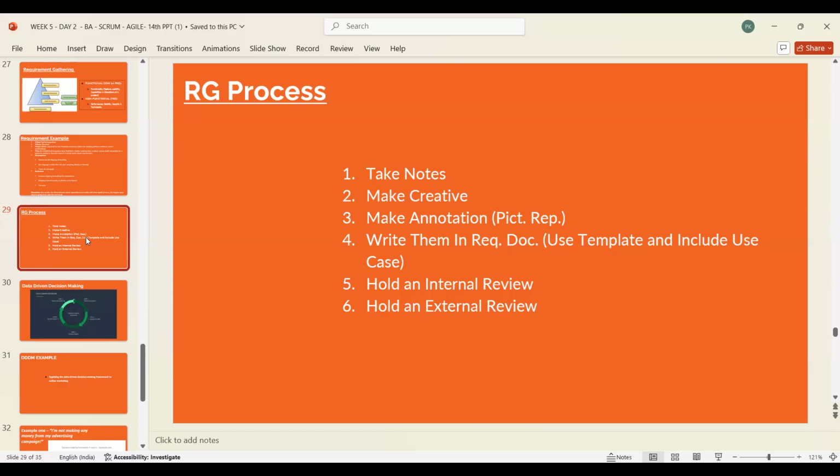Then signed by or reviewed by, say, Max, who may be your delivery manager. Then again reviewed by, per se, Rachel, who can be a steering committee member or another senior person, or checked by Sunita, who can be your department head. So this is the hierarchy where the person who prepares it, then one person reviews it, then one approves it, and it just goes higher and higher in the hierarchy until it can go to the project sponsor.